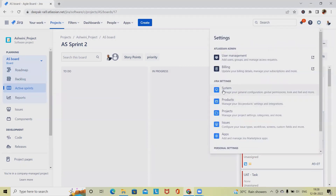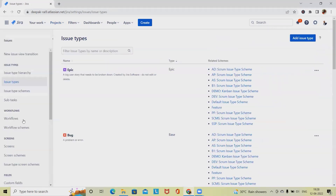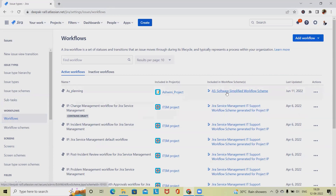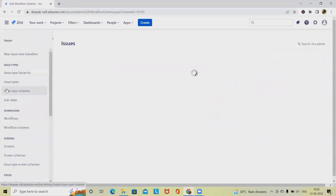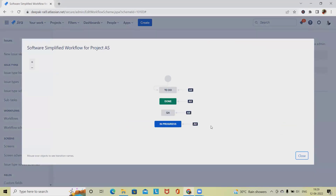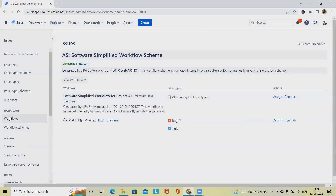Creating a workflow requires administrator login credentials. Once you navigate into the project, select Settings, then click on Issues. Here you will find the workflows associated with your project. These are the existing workflows linked to the project's issue types. If you want to create a new workflow you can do so from here, or if you want to edit an existing workflow you can edit it. Select any particular workflow and view it in either diagram or text view.